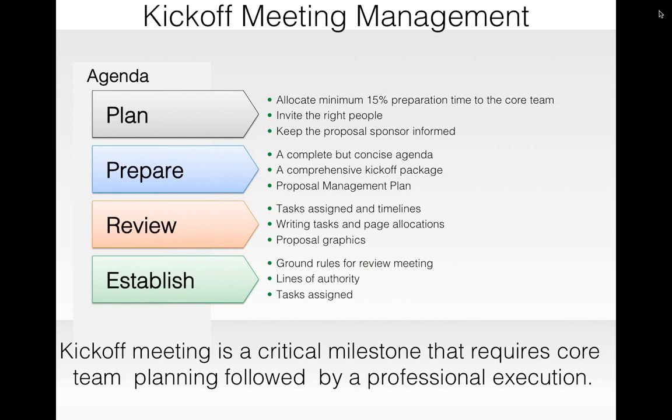And your proposal management plan, depicting the different roles in managing the proposal and developing the content of the proposal, their responsibilities, their timelines, their schedules, everything should come in your proposal management plan, which is nothing but similar to a project management plan.